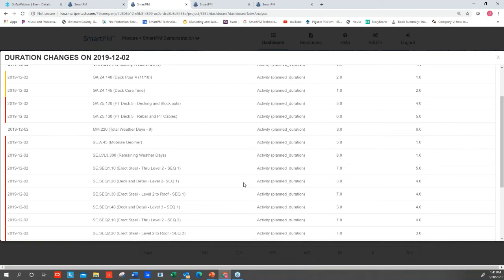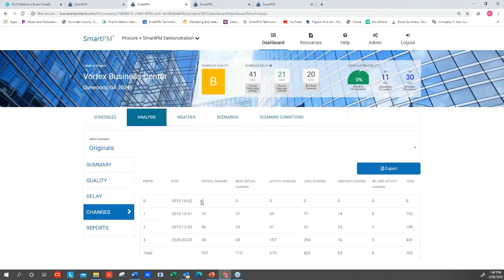That's one of the things I noticed in the industry that's a challenge, project controls teams keeping up with the decisions that are being made at the site. A lot of issues happen in construction, a lot of impacts occur. Everybody's always needing to change direction real quick, put out fires, make decisions. Sometimes that can get a little over optimistic, and that over optimism usually results in compression and ultimately maybe even misleading the critical path. And that's really where schedules start to die, when the critical path is off, it's over compressed, and the end date's not achievable, and nobody knows it. So this is a control for that.